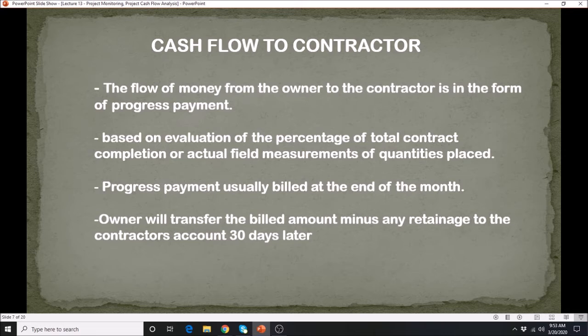All right. One thing that I want you to keep in mind, especially if it is a multi-million project, of course the general contractors are not being paid ahead of time, and a lot of times they apply for payment for the work they have done after 1 month or after 30 days.